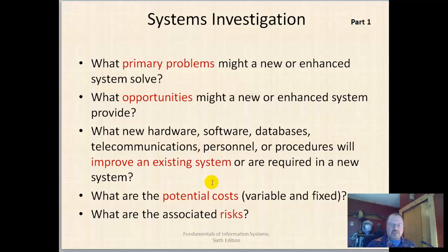in that new system. Now, what are the potential costs of this particular system? What's the hardware? What's the software going to cost? What are the big costs, or really anymore the people costs? So if I'm paying a systems analyst $70,000, $80,000 a year, and that's probably typical in Montana, conservative nationally, how much is this going to cost me for that project? Also getting in a DBA at $60,000 or $70,000 a year. All these pieces. What are these costs gonna cost me?